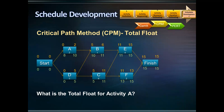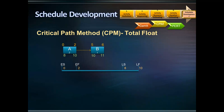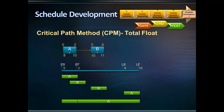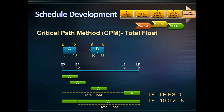What is the total float for activity A? The earliest finish date of activity A is at day 2, when activity A starts immediately. However, activity A can start any time between day 0 and day 8. If activity A starts later than 8 days or is lengthened more than 8 days, it will be completed later than day 10, impacting succeeding activities and consequently the project's completion date. So the maximum available time for activity A to float without impacting the completion date is 8 days. The formula: total float equals late finish minus early start minus the duration.